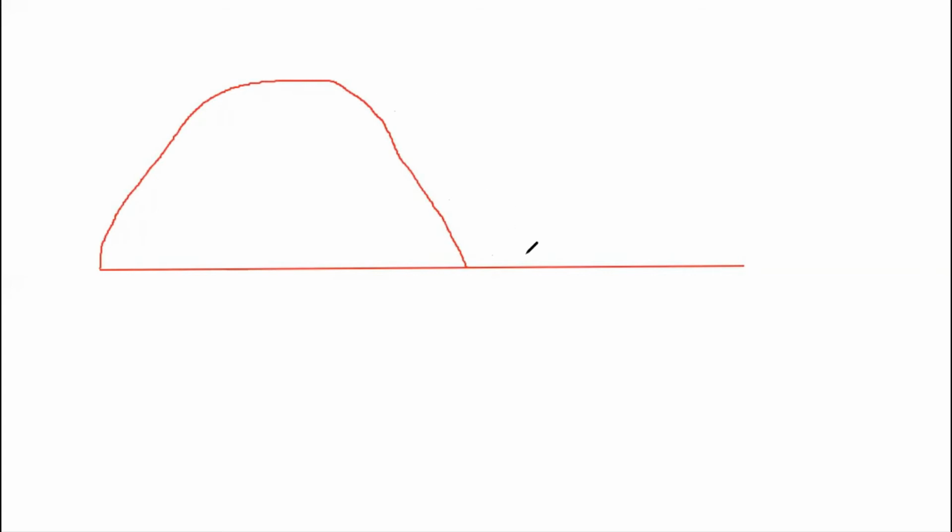So you wait. Later, once you get information for this, you do a small planning effort. Let's say this is for another 7% of the work, and you still don't have information for 3%. Then again you wait some more time and spend a little more effort to complete the remaining 3%. So this is called rolling wave planning, right? You can see almost a kind of wave form here.